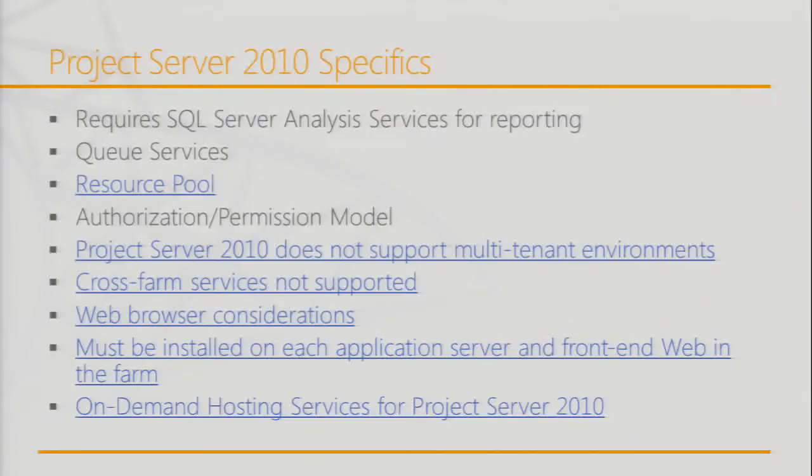Resource pool, I've already talked about. What's important here is that you're modeling everyone in your team, department, or organization because you want to make decisions about staffing, capacity, etc. To bring all that information in, typically people set up Active Directory sync, like hopefully a lot of you do with SharePoint. So you get all those resources, and you get what we call named resources, which is Christophe, the Microsoft guy, and you can have Joe the SQL DBA, etc.